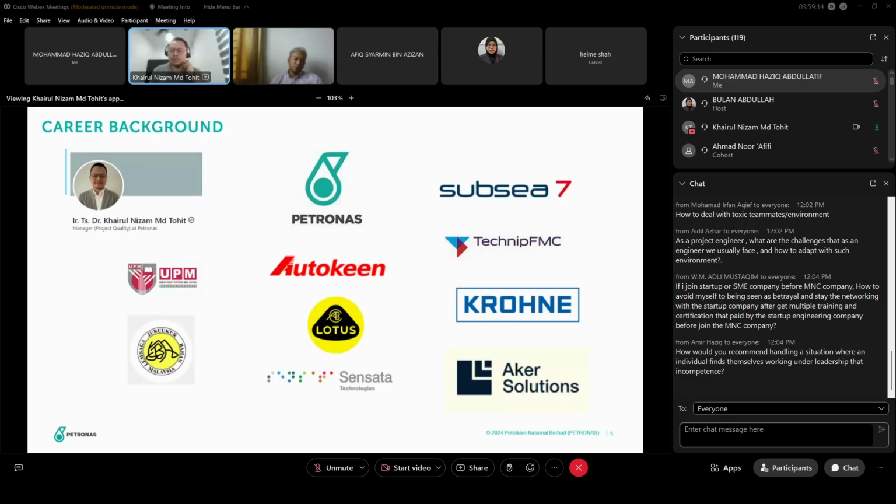Some companies call it a stand-up toolbox talk, right? Just to ensure we are aligned every morning before we start the work. What's the expectation? What are the challenges for us to deliver that day? So we don't wait until the weekly or monthly meeting to discuss the challenges, right? We have to work closely with our team, monitor the progress closely, and come up with solutions within that half an hour, right?